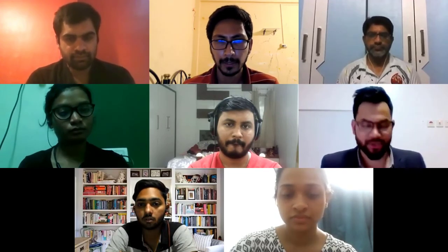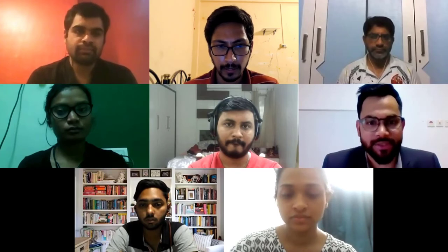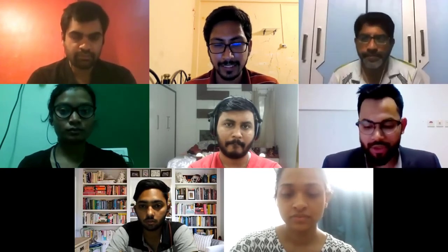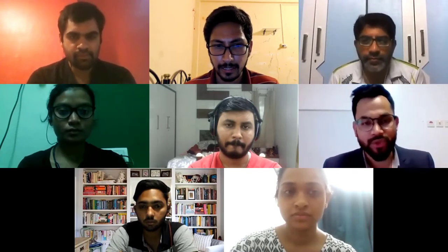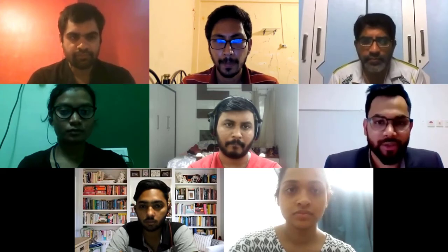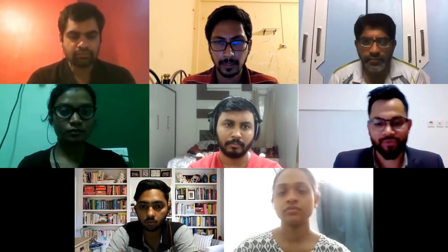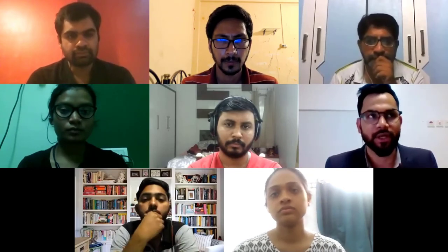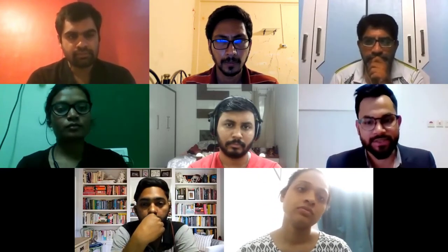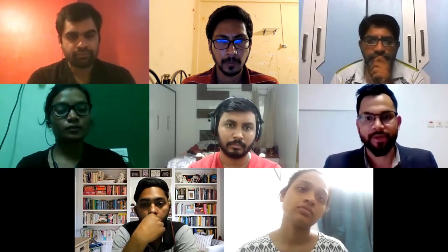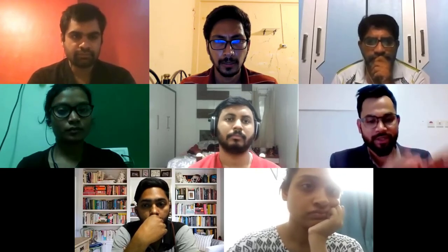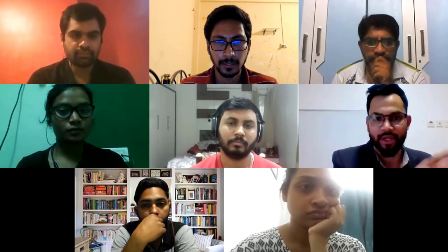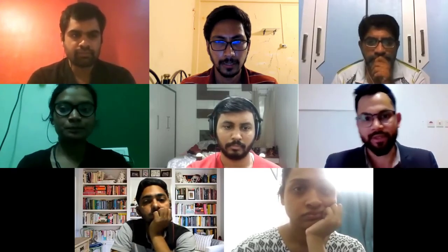Okay, perfect question. I actually skipped a lot of information because we have so limited time, so I didn't talk about the part of post-contract. If you are a contractor, it's a great tool because you have a lot of features for post-contract. The revision function is there. There is a segmentation function, which is going to split up different subcontractor zones, and that is going to say, okay, this so-and-so subcontractor has done this much of work, so this is his progress claim number 1. That's his payment on this date, that date.